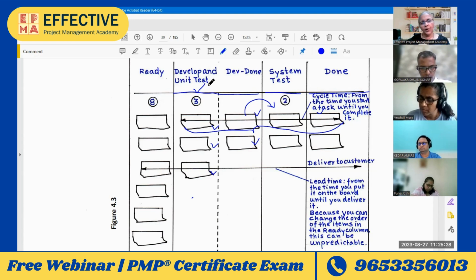The team finishes the story in 3 days' time. There is nothing to stop the team from going back and picking up one more story. So for maybe the first 1 or 2 iterations, it's good to take only one story at a time. So you also understand the nature of stories, the nature of work. You very clearly understand the bottlenecks. And once you have covered your bottlenecks, then you can say the team might want to pick up maybe 2 or 3 stories. They have a good judgment after 2 or 3 iterations. So let them decide whether they want to take 2 or 3, not too many.